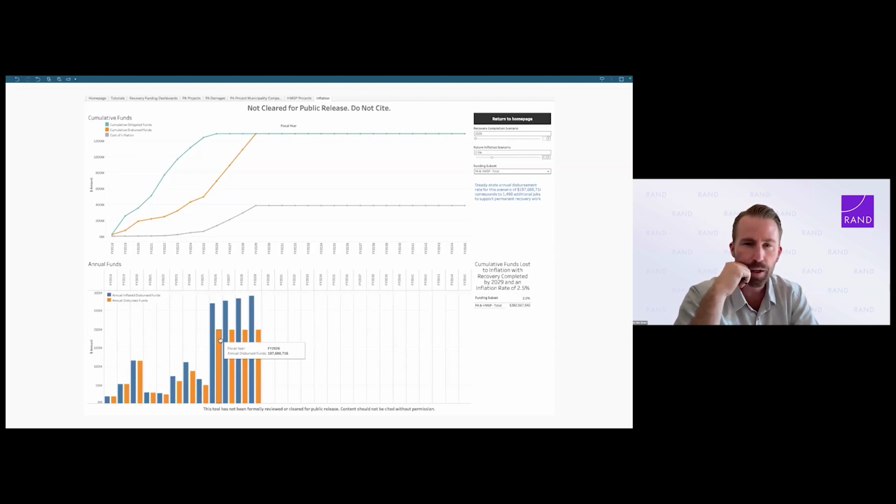So that could be aggressive, right? That could be challenging. The upside of that is we would save almost 43 million in inflation. So that inflation number came down quite a bit as we accelerate the recovery. You've got the opportunity to save 43 million. Certainly that is appealing, but you have to balance that against how realistic is it that you can surge 1,500 additional construction workers to do that work.